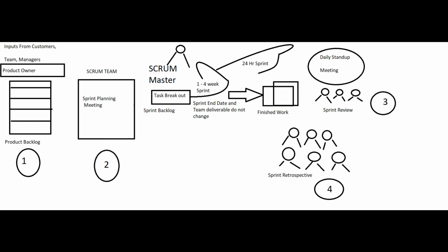The main objective of this retrospective meeting is this: after completion of your sprint, we deliver our product to the customer, right? So after delivery we go for the meeting called the retrospective meeting. During this meeting we can answer questions like what went well during your sprint, what went wrong during your sprint, what else we can do differently, and if there are any obstacles, what is our better approach to overcome that obstacle. These are all the questions we discuss during this retrospective meeting.